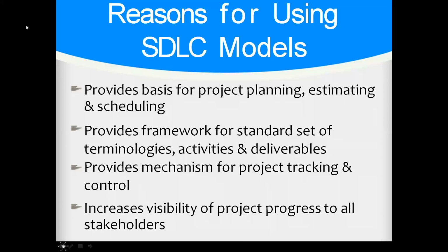Now, we go to estimation on resources and development. Give in your planning, as you are giving those categories, attach costs and resources to them based on what is possible. If you know that the project can start, what the project needs is probably a cloud hosting somewhere, or it needs a 3-tier or a 2-tier, and the man can only afford stand-alone. You have to state that for stage 1, we can only do stand-alone. For stage 2, we can go to 2-tier. For stage 3, we can go to 3-tier.